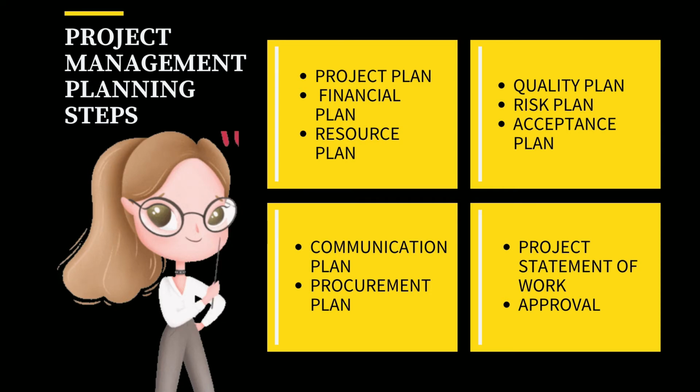First, create a project plan. It involves identifying the phases, activities, constraints, and schedule, and creating a project timeline with a work breakdown schedule and Gantt chart. Next, create a financial plan. Create a project budget and cost estimate and a plan to meet your maximum cost, complete with allocations across resources and departments. Next, create a resource plan. Build a great team, recruit and schedule the resources and materials needed to deliver the project.